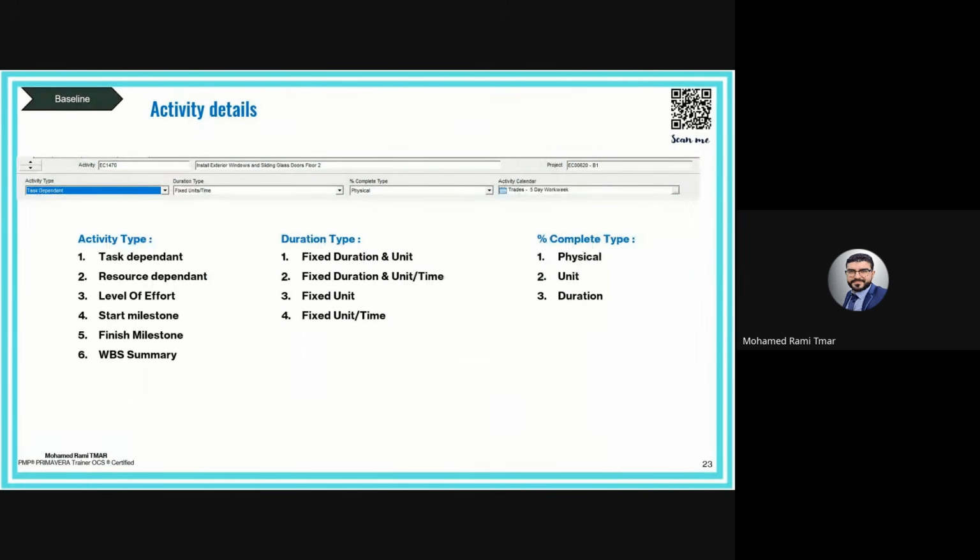And this is very important. The unit is a quantity, not just hours. Maybe in purely engineering, we can quantify by hours or even by number of deliverables. The unit per time is the productivity.